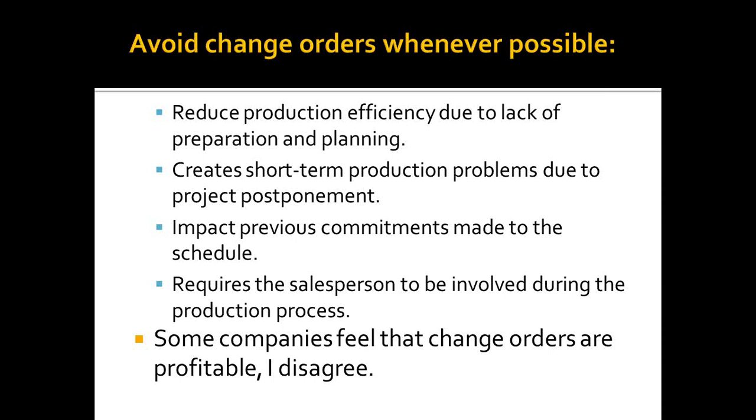There's some short-term production problems due to project postponement. What do you do with that crew while that project's on hold and we're busy getting the approval or making some of those design changes during the change order process? I think another really important aspect is the impact that it's going to have on the previous commitments that you've already made to clients on the next couple of jobs that now have to be pushed off or rescheduled.